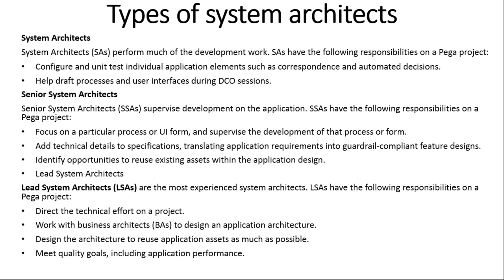And if you want to implement the functionality in such a way that after entering the customer details, I need to save them into the database, then the complexity of the user story is a little bigger. At that time, one developer will take only one story. So based on the complexity, one developer may take one story. Otherwise, if it is a very simple story, then one developer may take 2 or 3 stories. We will learn how exactly we identify the complexity. The complete team decides the complexity.